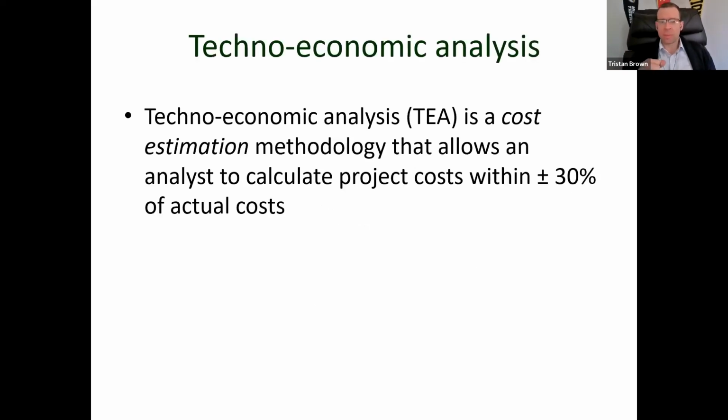So I always like to start with a definition of what techno-economic analysis is. The name gives you a little indication, right? There's clearly a technical side to it. There's certainly a lot of economics going on with it. And what techno-economic analysis really is, is a cost estimation methodology. This is something there's a lot of confusion about. A lot of people wonder what this is. It really fundamentally is just a cost estimation methodology. And what we use it for is to calculate project costs within approximately plus or minus 30% of what we would expect actual costs to be.